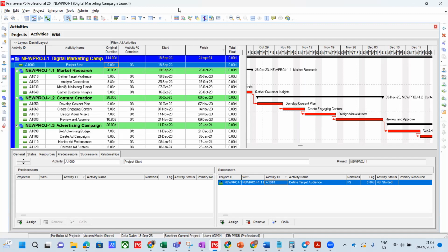If they're bidding for the job, they must say Daniel, £200 an hour, Ade, £120 an hour. And Daniel, if he's doing the job, it will take 5 days. But if Ade is doing the same job, it will take Ade 7 days or 10 days. They will now look at which one they want to get.